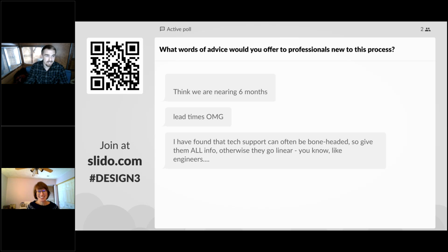Yeah, it's a really important comment during 6 months of wait time. And I don't know how different it is between the different manufacturers, but that's something you'll want to ask the manufacturer during the submittal process. Like if you're a project manager and you think this job's going to be done in 6 months, you need to check with the manufacturer that they have a really short lead time on their equipment, or else that could push the entire project out by at least 6 months.